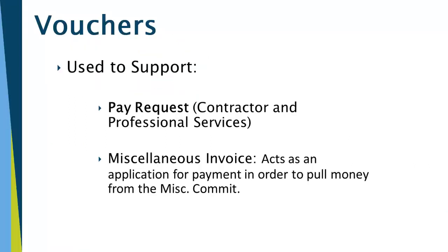Vouchers are used to support pay requests, including contractor and professional services. Also miscellaneous invoices, which act as an application for payment in order to pull money from a miscellaneous commit.